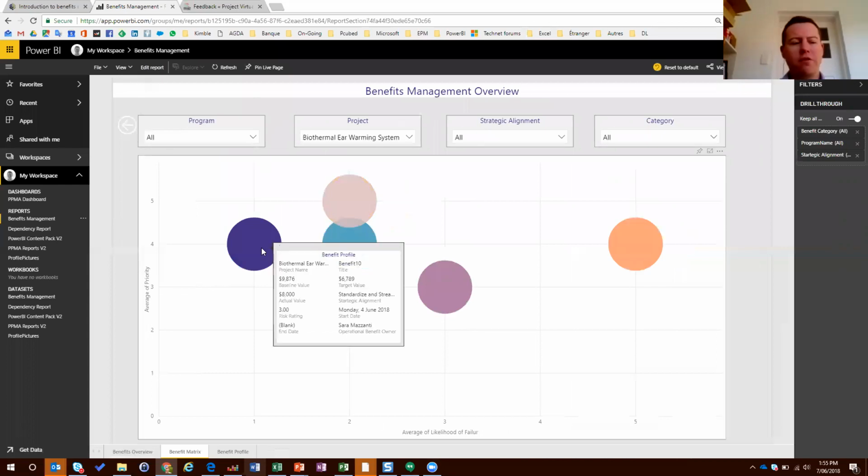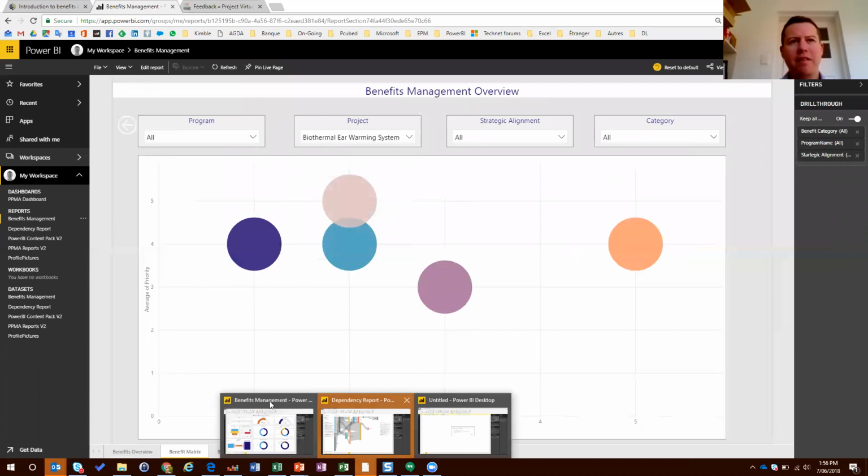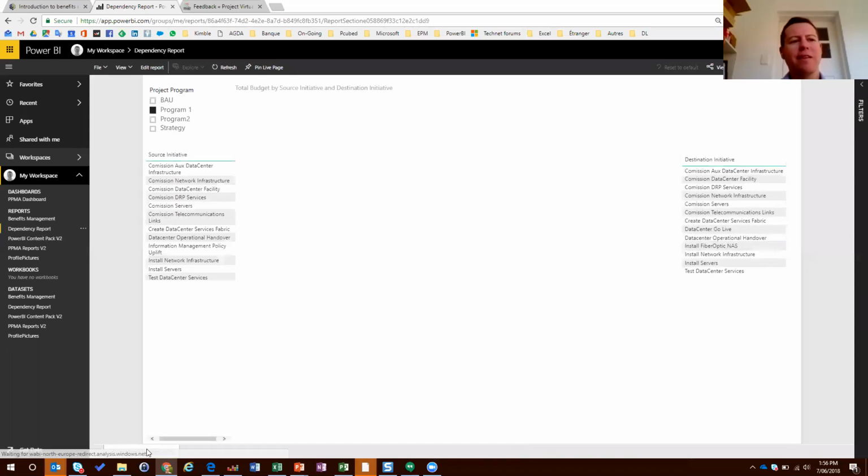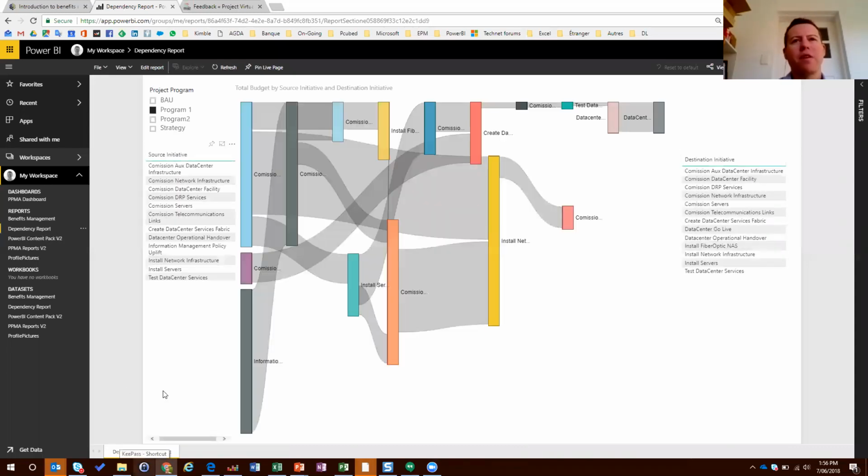The other quick one I wanted to show you before I hand over to the Q&A is a dependency map. That dependency mapping here using a Sankey visual is something really which I like. It's using a custom field actually where we are recording which one is the predecessor, which one is successor, because we have trouble gathering the deliverable dependency information in Project Online.